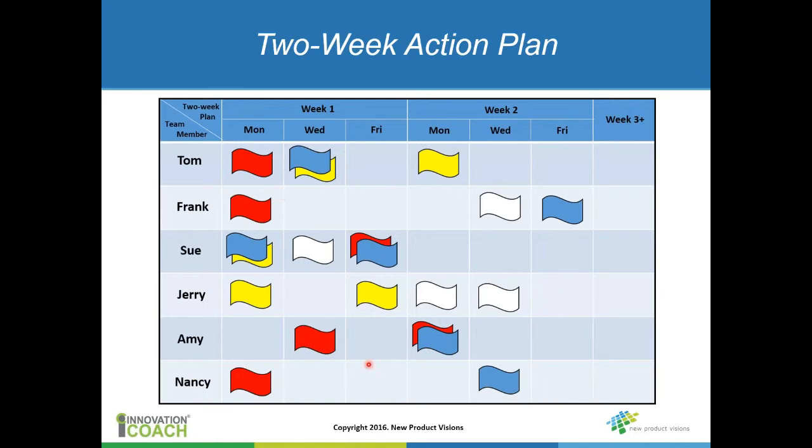Let's say these are sticky notes that define the tasks. You can use some color coding, say red for high priority, blue for lower priority, yellow for lowest priority, or whatever. The white maybe is unplanned work, or that particular team member is out of the office. So this is what's going to drive your actual stand-up meeting, the discussion around these actual tasks.